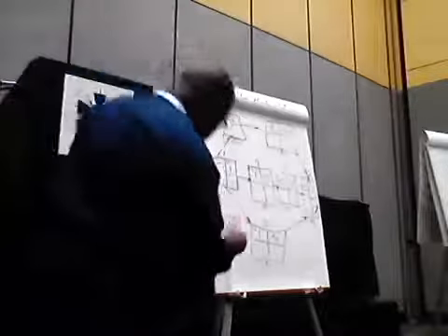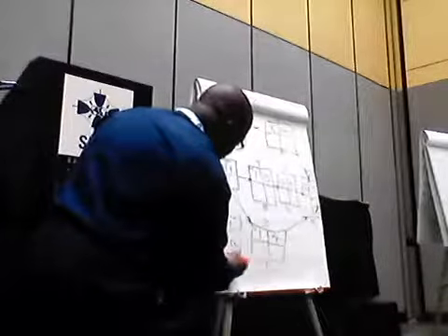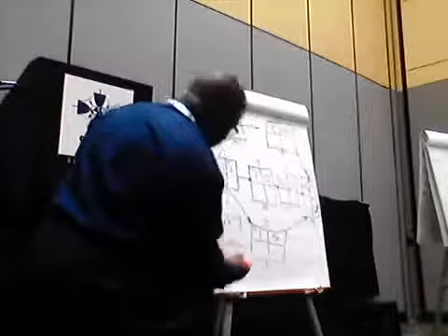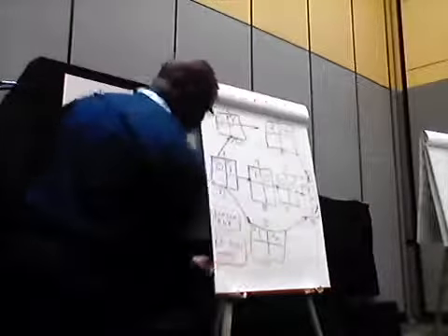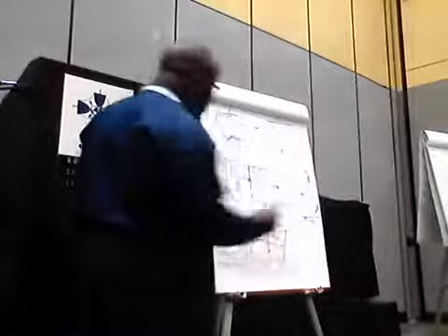Now, going forward, we were adding, addition. Now we're going to be subtracting. So we're going to subtract the late finish minus the duration. So you can say late finish minus duration equals what? Late start. Late finish minus duration equals late start. So 17 minus 2 is 15.